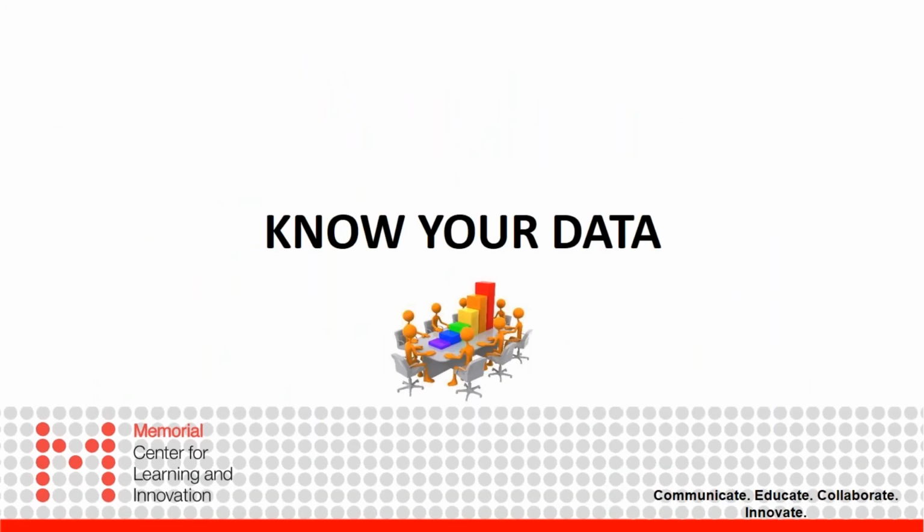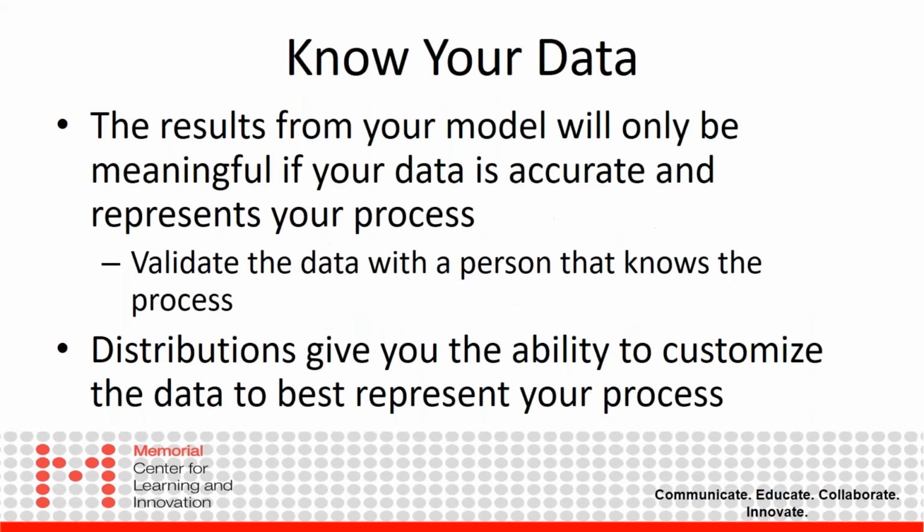And lastly, one of the most important things as you're going through and building your models is we want to make sure you know your data. As we all know, your outputs from your model are only as good as the inputs of the data that you are putting in. So what we do is, when we collect all of our data, we circle back and validate it with people that are working that process. So this sort of links back to knowing your process.